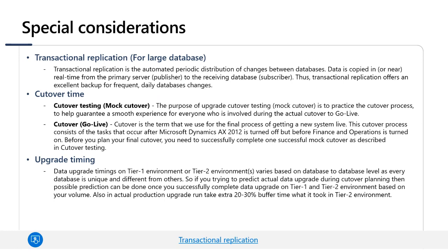Cutover time. You should break down your overall upgrade to determine where you have to spend the extra time and resources. Your dress rehearsal is your mock, and that should be used to make minor tweaks and to determine the overall time with a detailed breakdown of the pre-upgrade, upgrade, and post-upgrade steps necessary for your switchover. In the documentation, we will see two terms: cutover testing, which is nothing but the mock cutover, and cutover go live.